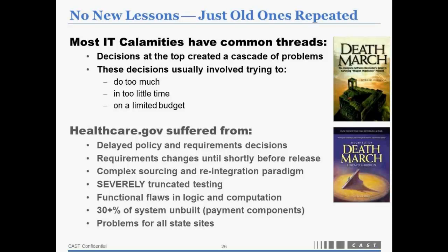In terms of looking at the hard reality of what goes on during a project, one of the things you see frequently in project status reviews is what some of us refer to as watermelon charts, or some of you might think of them as traffic light charts, where the symbols look green, but they're really red on the inside. And if you're not looking at the actual asset as it's being developed, you can't really see what's on the inside, right? So you're getting perhaps not the most objective impression of how the product is evolving.